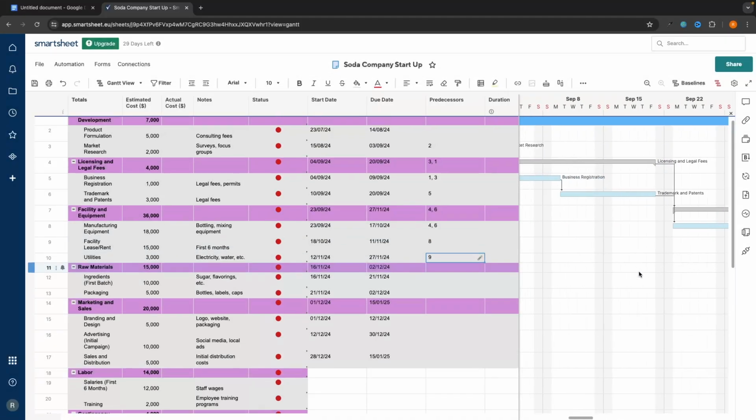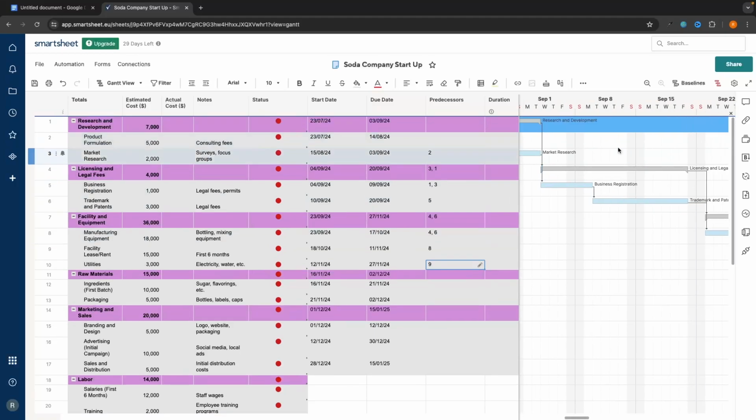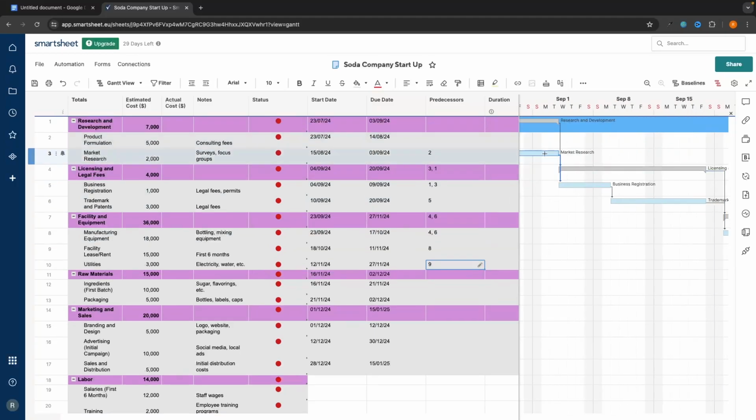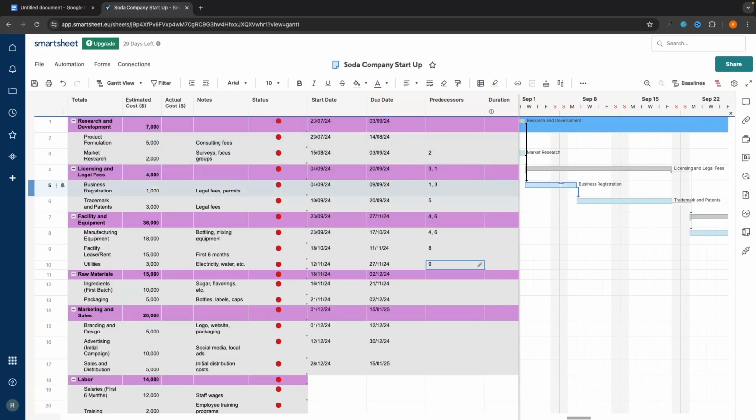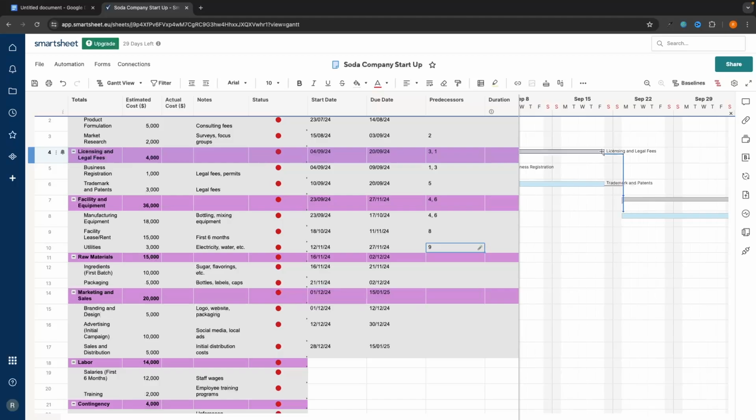And as you can see, this is really starting to come along now. We can see on the Kanban board all of the dependencies leading to each other. Once we have completed the last subtask, meaning that we also complete the category, we start the next category, meaning we also start the next subtask. Then this subtask leads to this subtask, and once the last subtask has been complete, of course this means the end of the category, so this leads into the next category, meaning the start of the first subtask as well. So that is how you can use dependencies in Smartsheet.